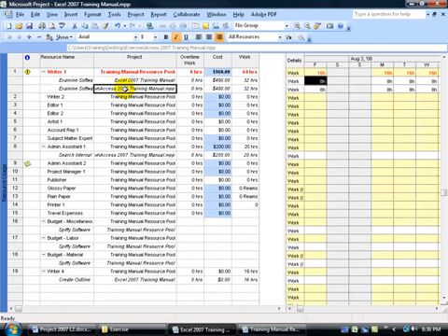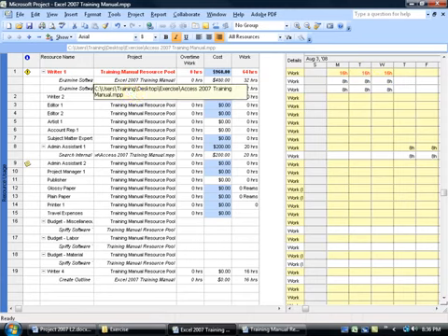So in another project that's on the desktop, you can say, okay, they've got these days, so what I need to do is either push my task out so it's not on these same days as the project manager in Access 2000 has that task on, which would probably be the best, or if it's not too much, maybe give that resource overtime in your project. Working 16 hours is enough to really wipe out anybody, so you may want to push or delay your task, or like I said, you can use the resource level as we covered in a previous training video.